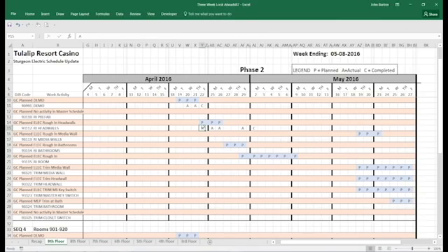And if the general contractor starts moving these dates up or back, one or the other, you're going to figure that out as well. So he's either accelerating you or he's experiencing delay that's causing us more time on the job than we originally planned. So just fill these out, and then every week you're going to fill it out from the previous week and just fill in that week. So for this week, you're going to start filling in here.